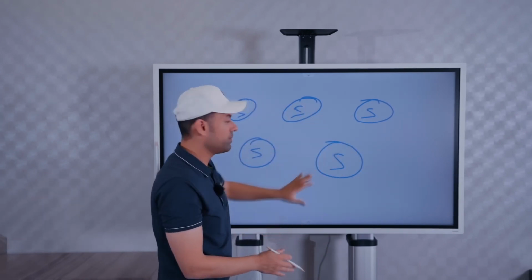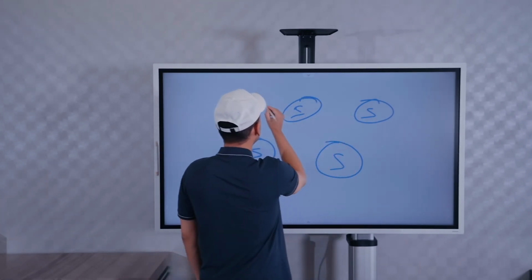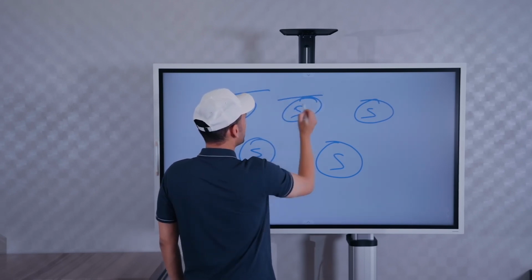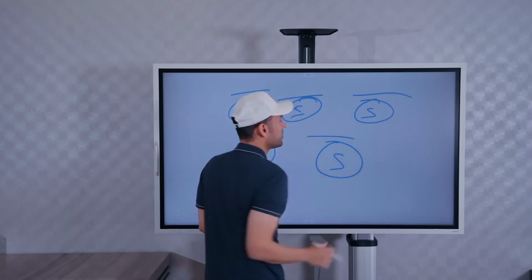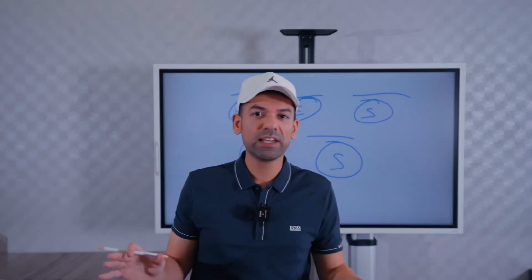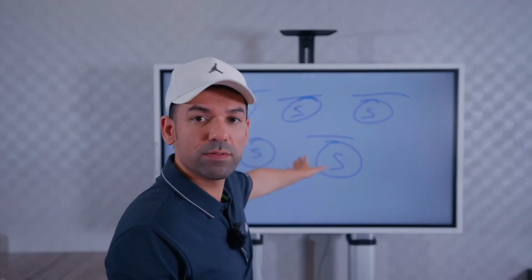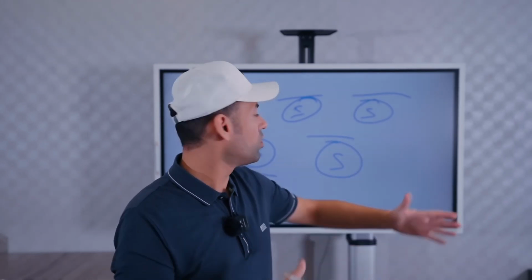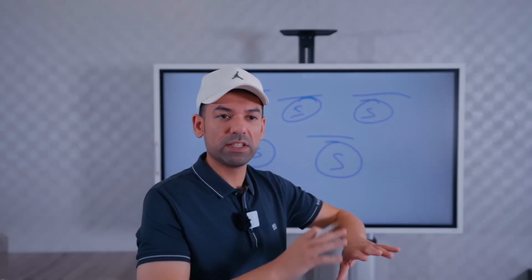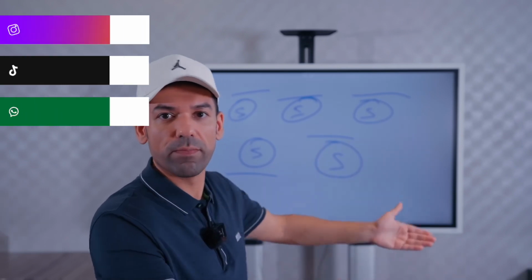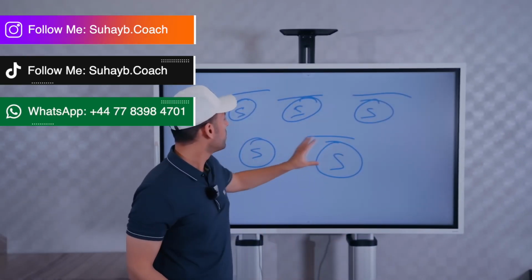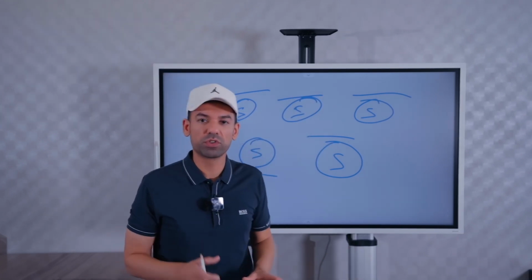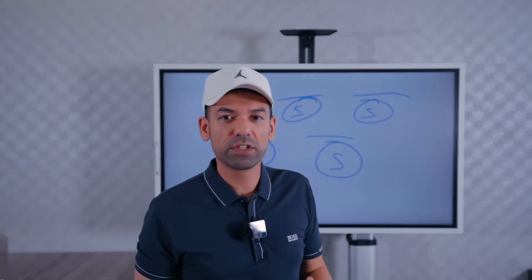Each and every team is working in its own cadence. This team might be working in another cadence, another deadline. So none of these teams are aligned. It's impossible to align these teams because there's no rhythm here. There's no heartbeat. They're working to their own rhythm, their own deadlines. So number one problem, we cannot use the traditional Scrum methodology to deliver this project.